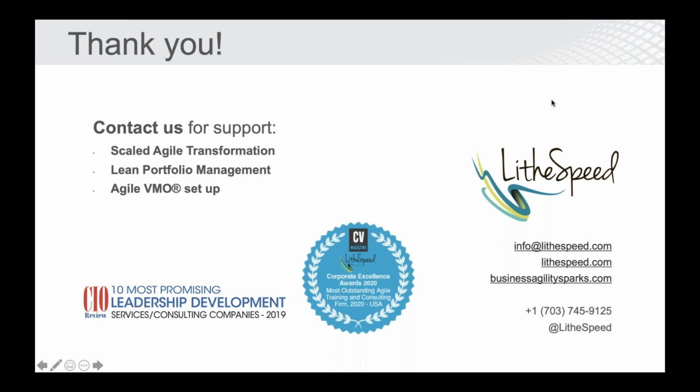If you take the LPM course, you'll find that we've added guidance about the frequency in which the portfolio team should meet. And we're actually recommending, and it may seem like a lot, but in my experience, in an Agile environment, monthly is a recommended frequency for the portfolio team to meet. And in the course we lay out an entire year of meetings, because sometimes you're meeting about the status of the epics in the portfolio,